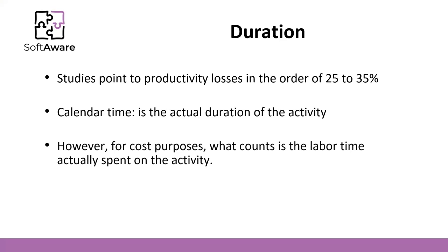Calendar time is the actual duration of the activity. However, for cost purposes, what counts is the labor time actually spent on the activity — the effort. When we do cost estimation, we will use the effort. The duration is used to communicate the calendar date to the customer for when the work will be accomplished.